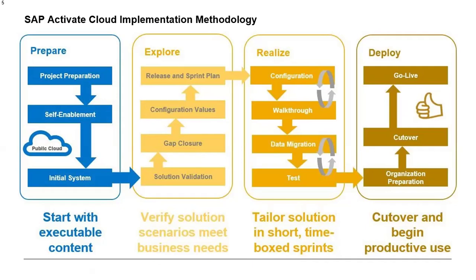This is called the explore phase, in which we will realize what solutions we need to map and what gaps we are seeing in the system. We need to configure the things and work in sprint phases, for example sprint one, sprint two, and sprint three. In sprint one we will cover some topics, in sprint two some topics, and in sprint three some topics. After completion of these three sprints, we will have done the explore phase, in which we have the solutions and have done the mapping of every pointer from the legacy to SuccessFactors.